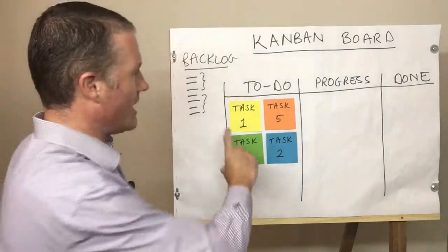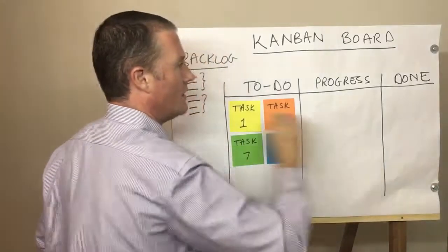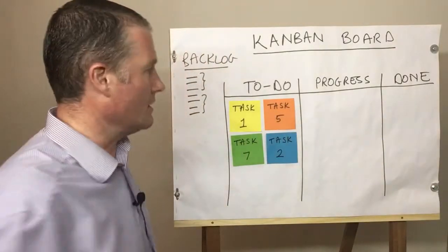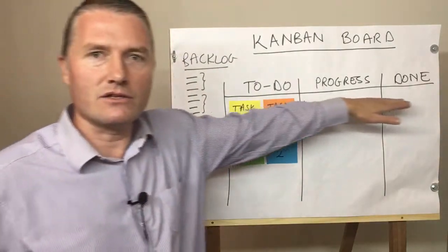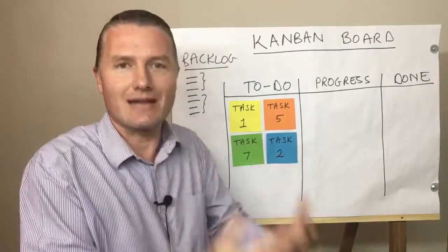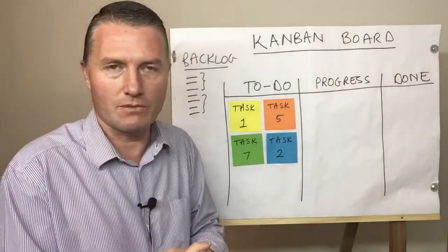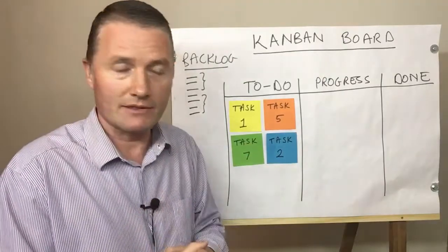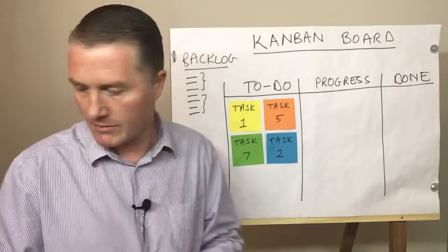You can also have different, what they call swim lanes, running along this Kanban board here. So in a certain swim lane, that would be work allocated to a certain individual or to a certain team or as a certain type of task. But let's keep this simple for the minute. And I once again would advise, if it's your first Kanban board, also just keep it very simple.